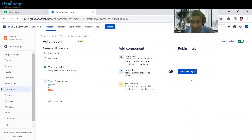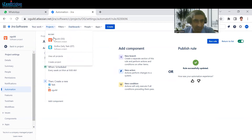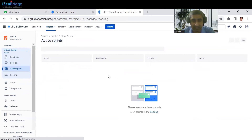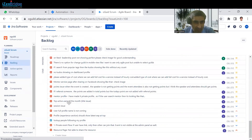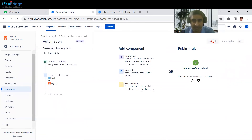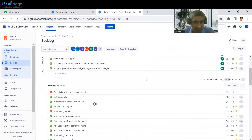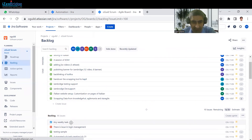Then save it and publish the changes. Now let me show you the backlog. You can see currently there is no item in the backlog with that description — no task of that kind exists yet. I'm going to run this rule manually now. Even though it's scheduled, we can also run it manually. Just run the rule. Now the rule has executed. We can check — you can see that the task has been created with the description 'any weekly task'. So every week this rule will execute and you'll get this task in your backlog automatically.